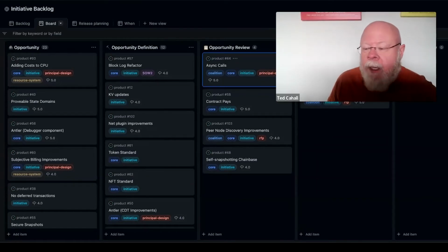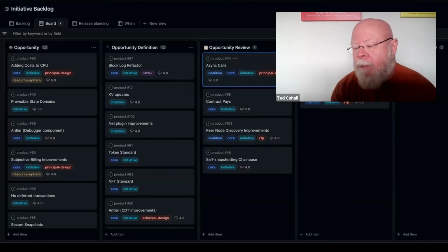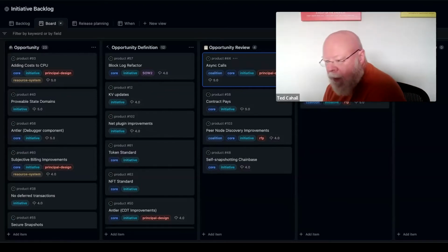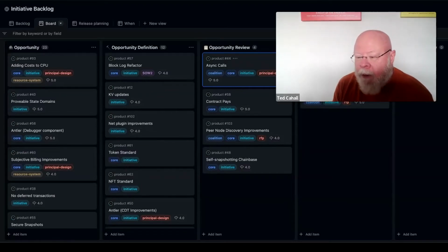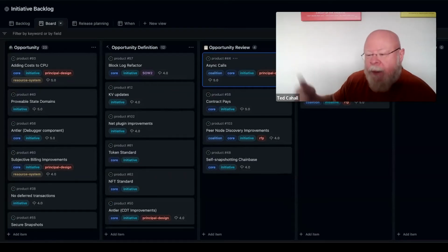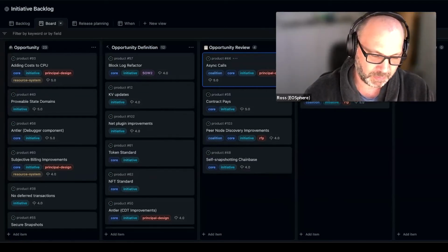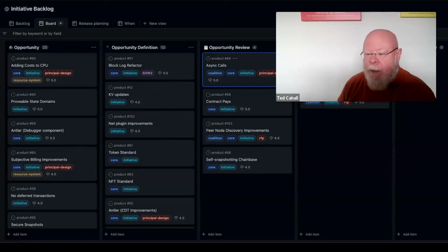It won't be purely agile for the way we do our major releases, our biannual major releases. Those will be planned events. And we may run weekly updates and statuses and all that, but we'll have front-end loaded the major features in the release, and the agile stuff will be mostly the cleanup of stuff that's fluxing through at a predetermined budget level.